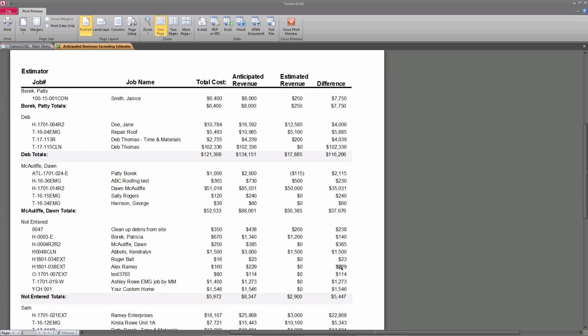If my estimated revenue is correct and I can't squeeze another nickel out in the sales invoice, I'm going to look at that gross margin. Did somebody forget to change it to 40% from 50%? Did they get approval and just not adjust the record?